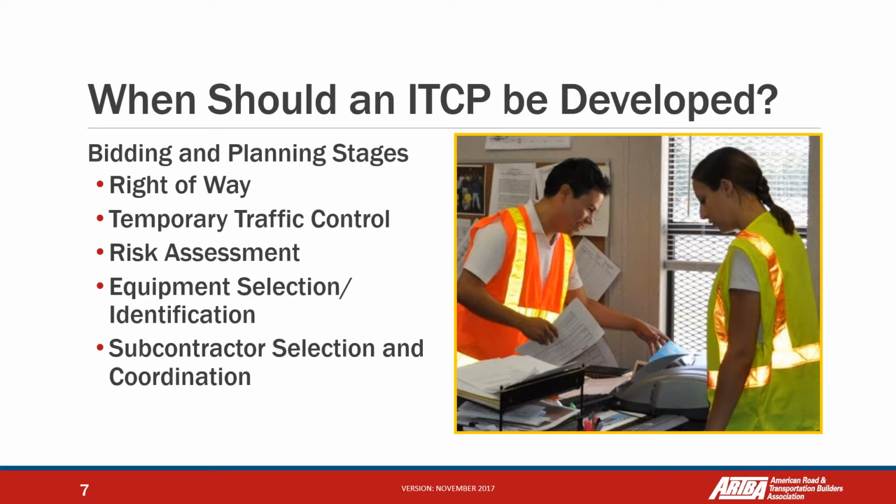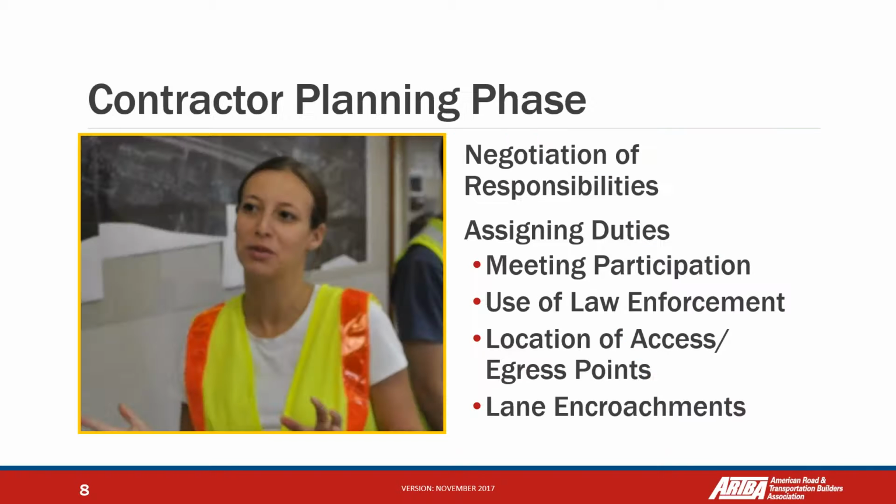For example, asking for the EMR, the experience modification rate, to know, okay, if you want to work with me, show me what your EMR is, and according to this, I can realize if you are above or below the safety average in the industry.